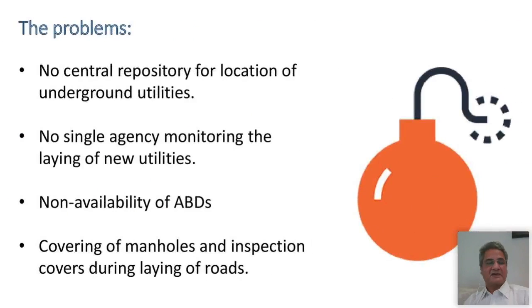So the problem is that, first of all, there is no central repository for the location of underground utilities. We do not have a single department or a single number where we can just call up or go there and say, give me a repository of all the underground utilities. There is no single agency monitoring the laying of new utilities. So even if you have a very updated database today, tomorrow it will change, because no one is updating it.